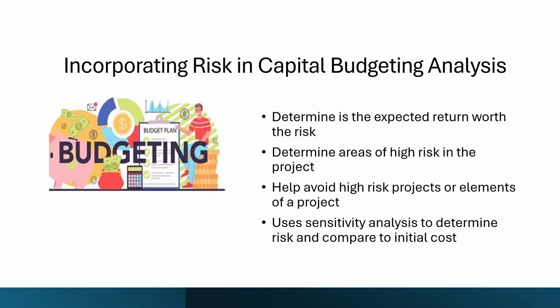By changing the key cost variables one variable at a time, then recalculating the total cost of the investment, it can be used to see if an acceptable return or if the risk of taking on that investment is too high and not worth it. Risk-adjusted metrics can be used to determine if the project's expected return is worth the risk. It includes the risk-adjusted NPV and the AIRR, adjusted internal rate of return.